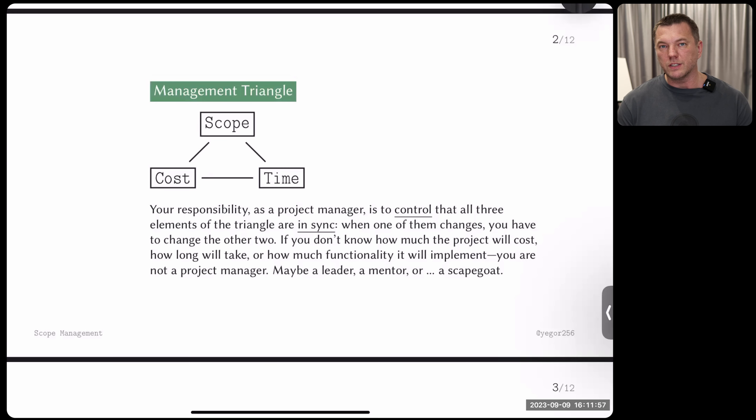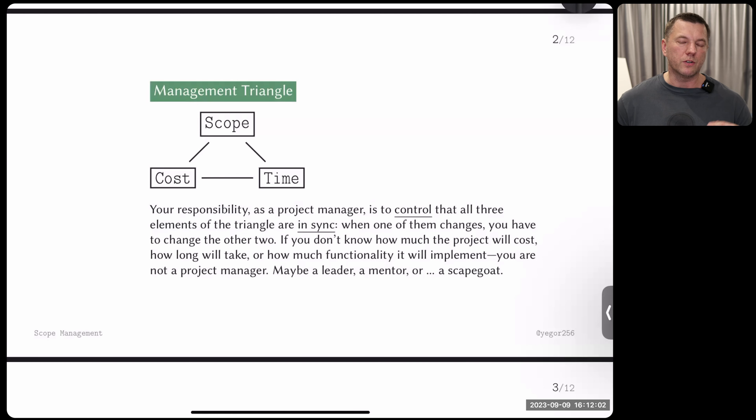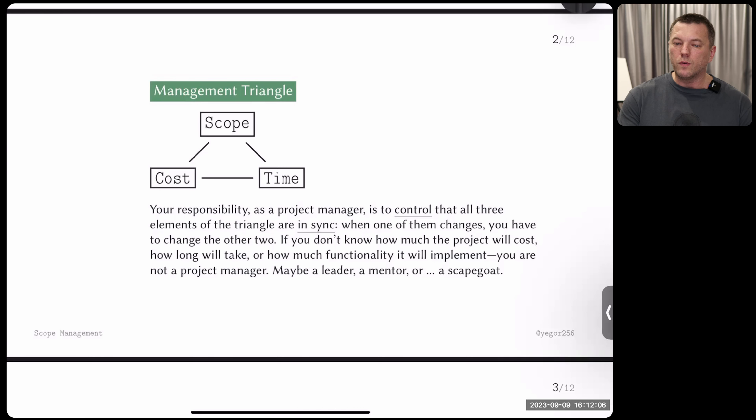Your role is to keep these three elements in sync. When one element moves in either direction — increases or decreases — your job is to move the other two as well. For example, if the customer says they want to finish sooner and you just say okay without adjusting the budget or decreasing the scope, that's your fault as a project manager.